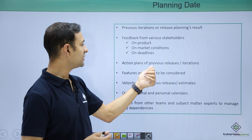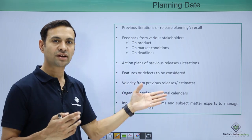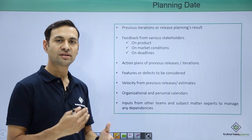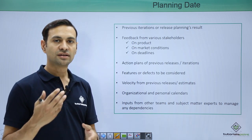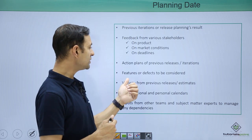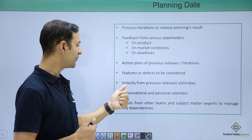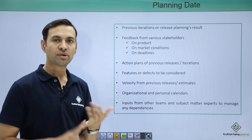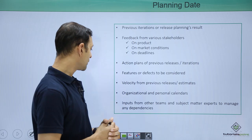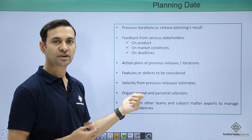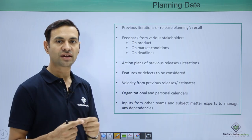An action plan on previous releases and iterations basically states: the problems we faced during previous iteration or release development should not occur again. We review what action items were taken so we can develop without any glitch. Features or defects to be considered are enhancements to be done to the product. Velocity from previous releases is also an input — it tells us the effort estimate put during development. Organizational and personal calendars indicate how many holidays fall in this time frame so we can establish our schedule.